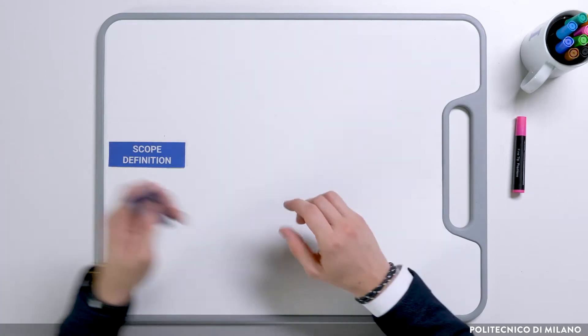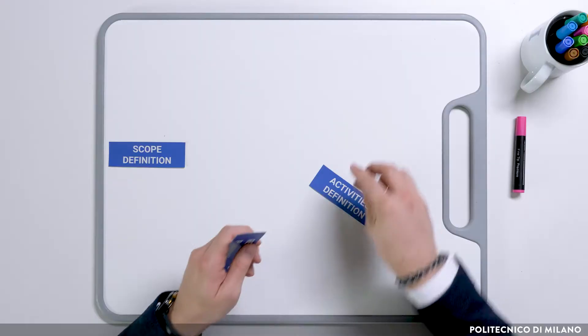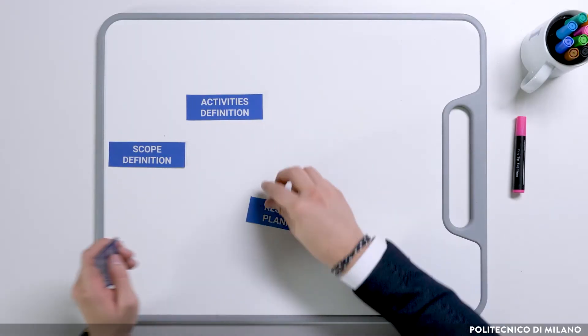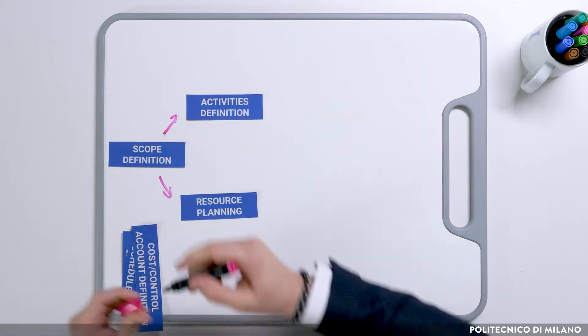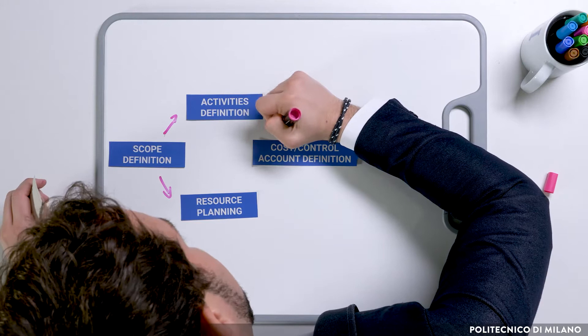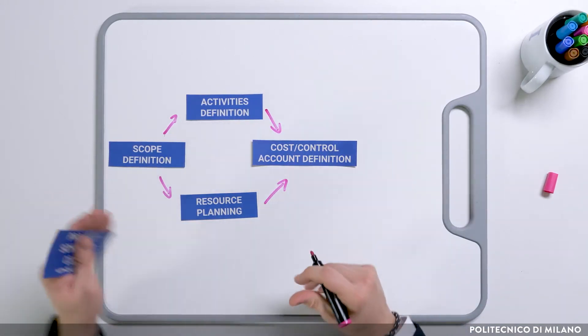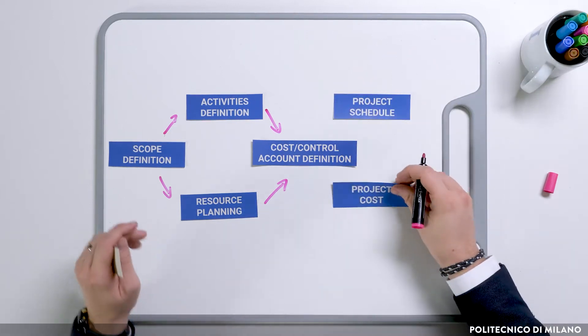Let's start with a brief sum up. In the planning phase, in the very first step, we should define the scope of the project through scope definition. Once we know what is and what is not part of our project, we can put in place two tools: the WBS for activities definition and the OBS for resource planning. These two views can be taken together with the RAM, defining who is going to do what and therefore defining the duration and cost of activities. This means we first define the cost control accounts, and then we can do the project schedule and the project cost.